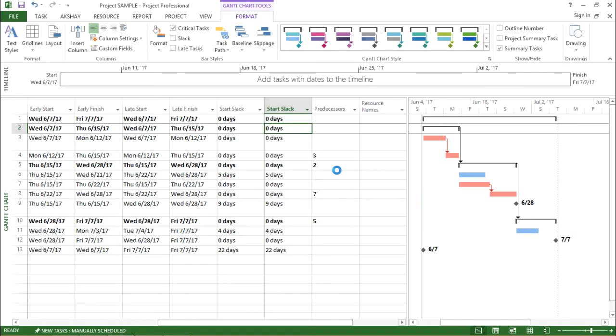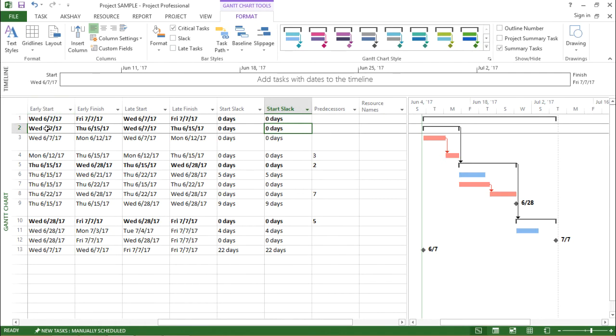Now let's understand what is Start Slack. Start Slack is calculated as the duration between Late Start and Early Start of a particular activity. Or in simple words, it is the difference between Late Start and Early Start.